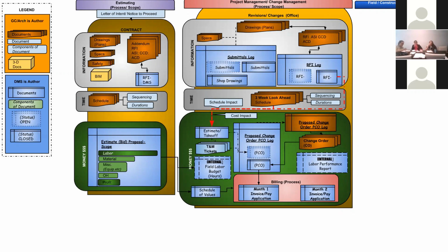So example would be, let's say on guide dogs, let's say there was $10,000 worth of changes. If they approve those changes, we have it on our billing because we have to revise our billing schedule, we have to revise our billing form to include these changes. We've agreed on the values, and now it's not negotiable. It's there, and so when that time comes, we can just put percentages onto it. Oh, we're 50% done with that change, charge 50%.